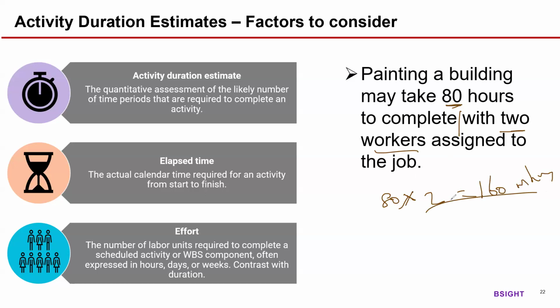So our class is for 3 hours. So duration of our class is 3 hours for today. As of now, we are having 16 participants. But how many man hours we are spending? Each one of us, we are spending 3 hours. So it will be 16 multiplied by 3. So 48 hours we are spending. 48 man hours we are spending here.